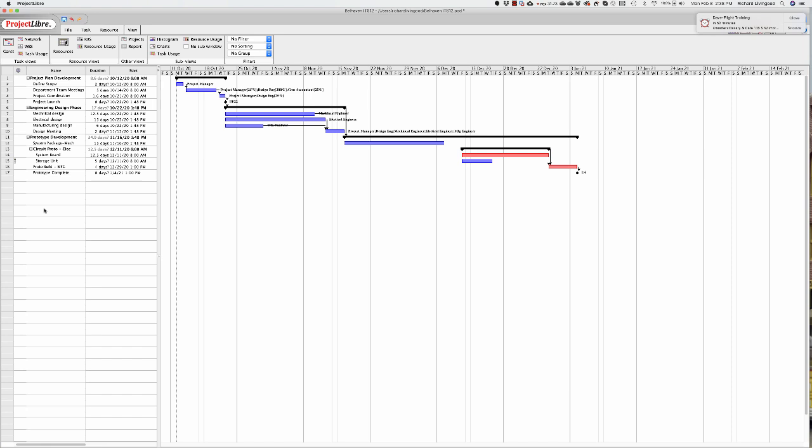We haven't done that here, but you could have a situation where you have to add in materials. You could do it by adding them in after the fact, but it's nice to have them scheduled, because if something changes, you can do it inside the project management software, and it'll account for it automatically, including time. Because let's say that you leased a camera, and you had just one camera in there, and that's what you added in after all the workers were put in, and then you just threw the camera on top of the cost.